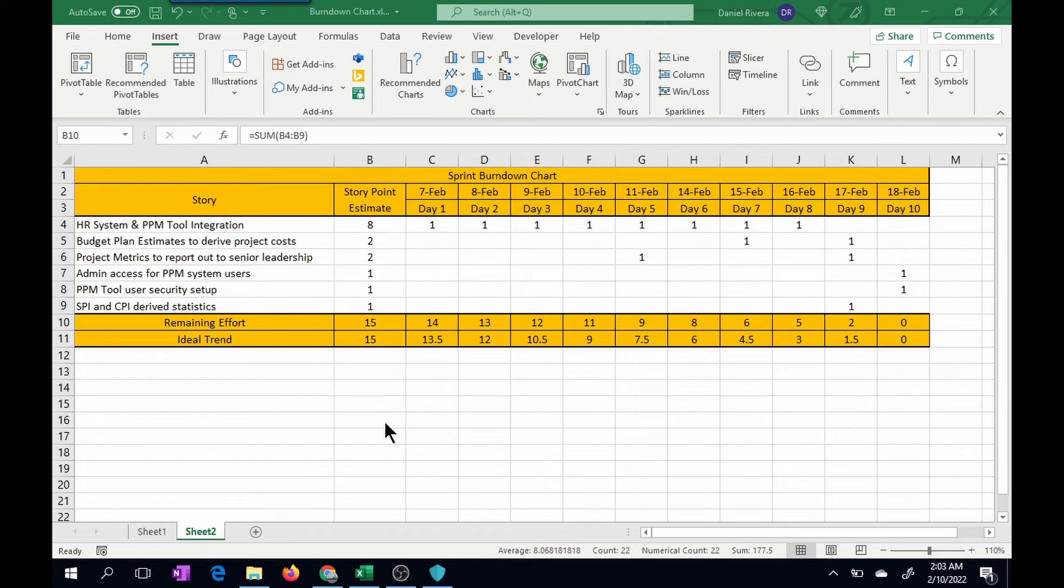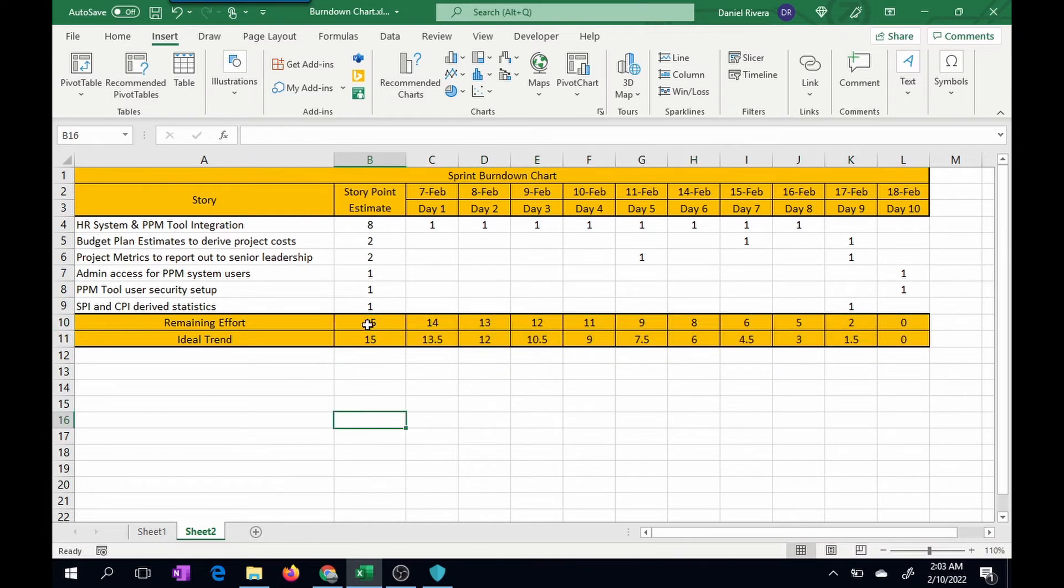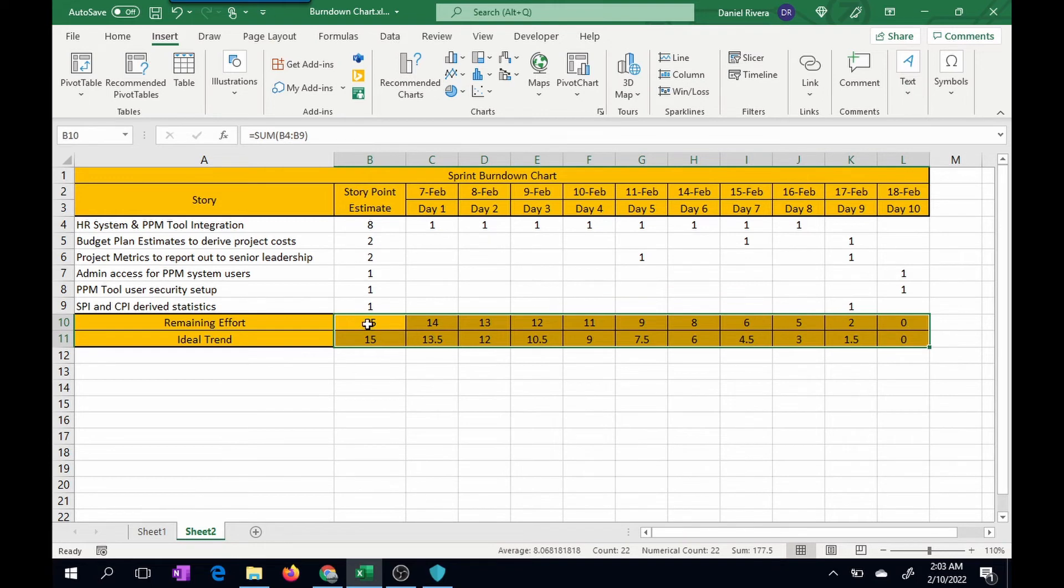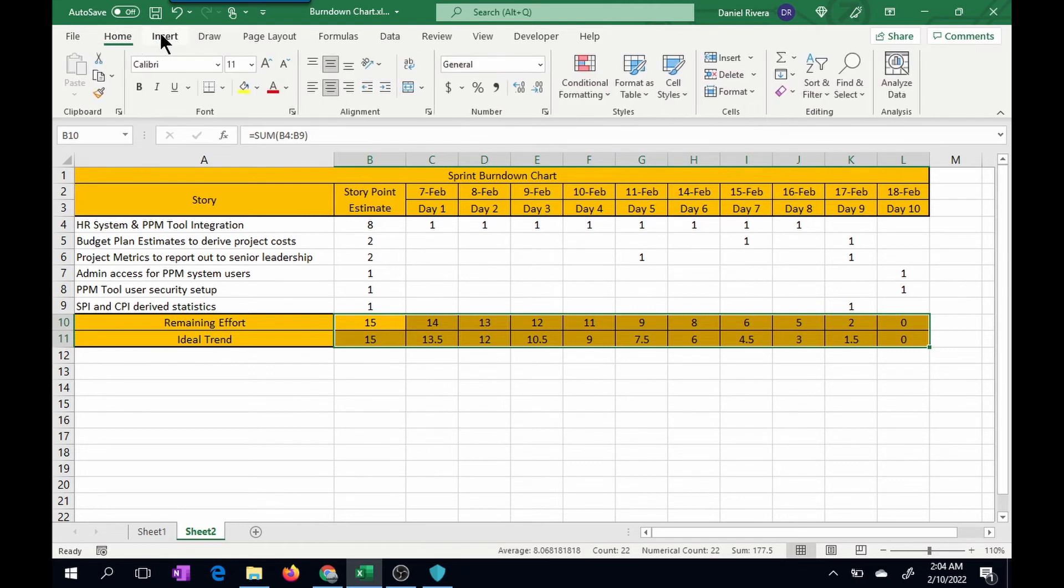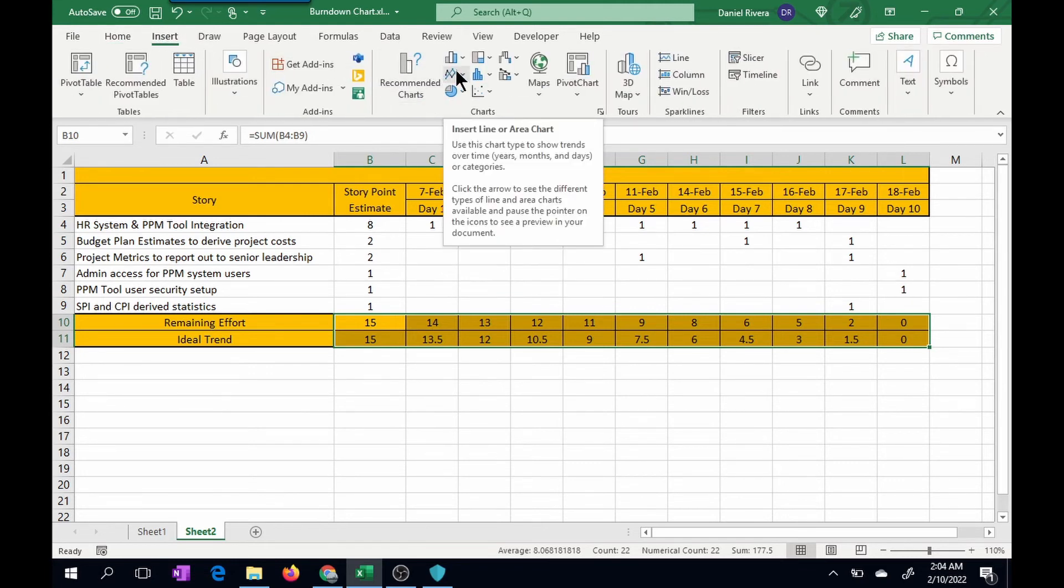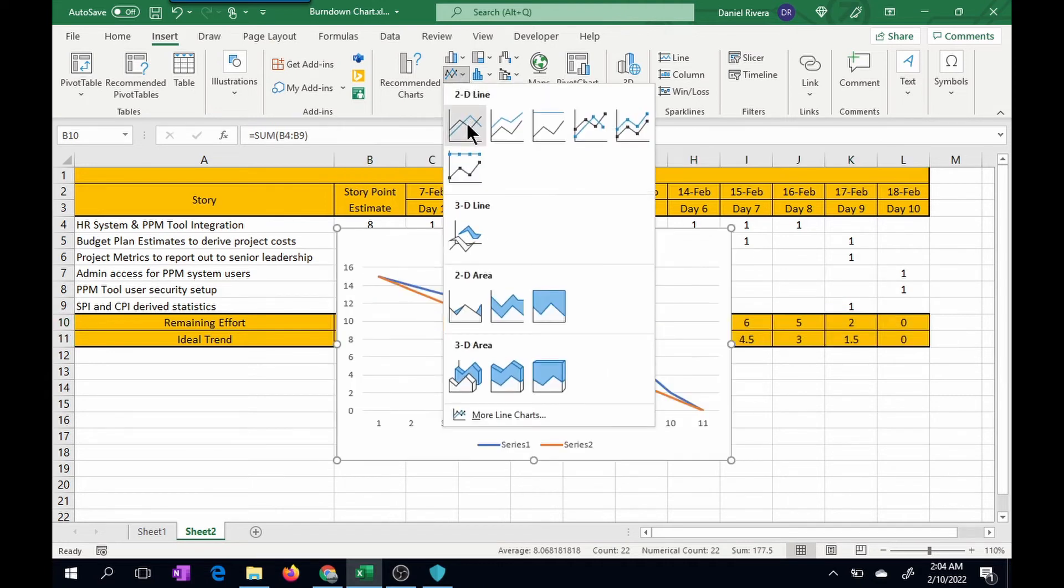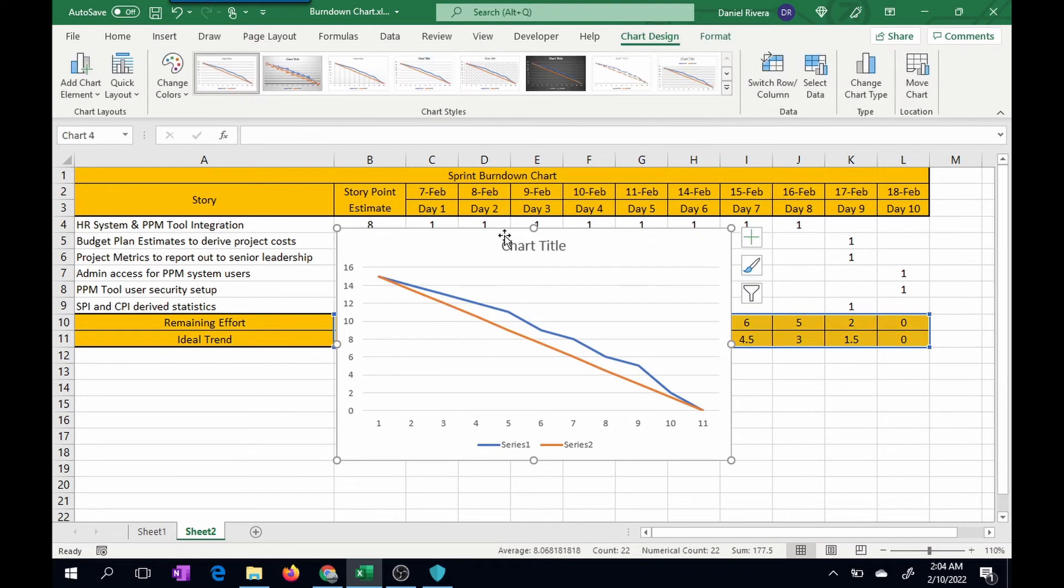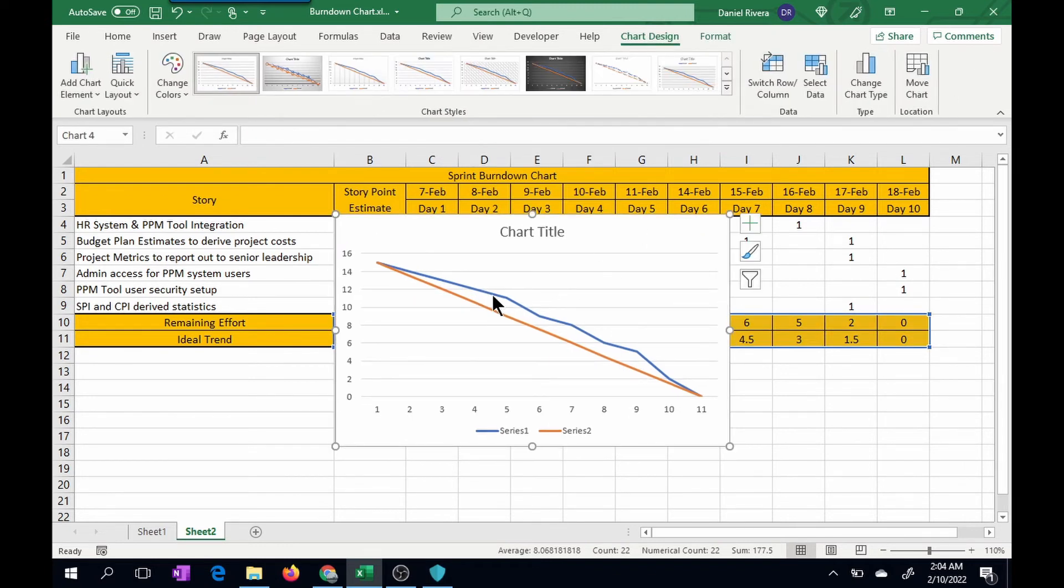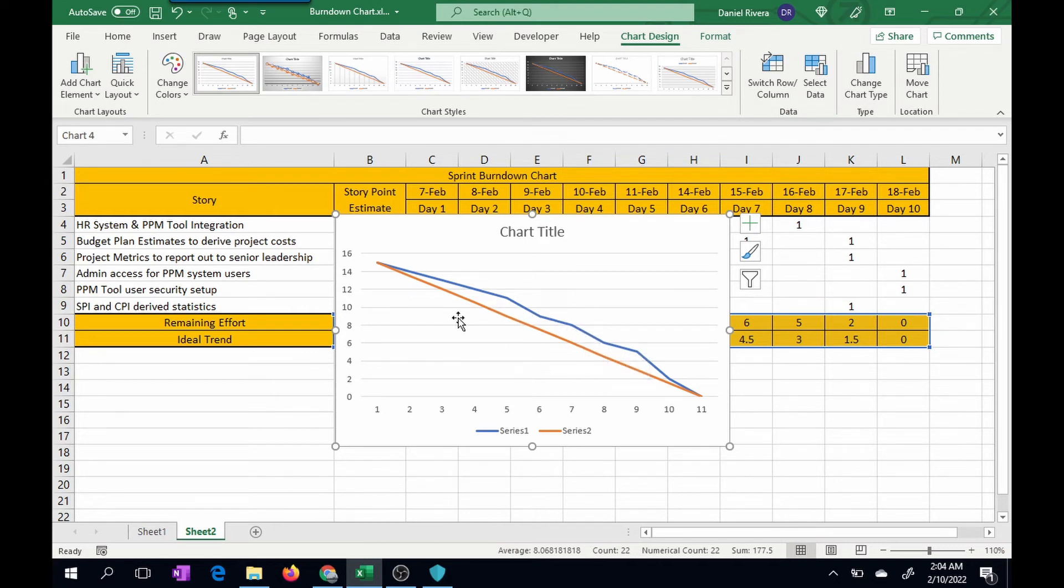So the next step is I want to insert the actual burndown chart. What I have to do is start by selecting all of these values here in both these rows from column B through L. I'm going to come up to my insert menu, which is here. And here you have line charts. So you drop down this list, and you can pick the first 2D line chart. And when I click on that, you're going to notice you see the burndown here. What the blue represents is your progress, and what the orange represents is your trend line.